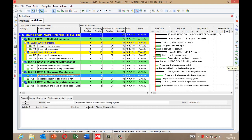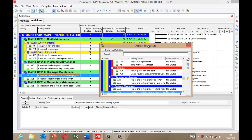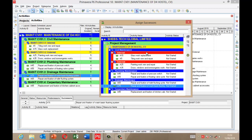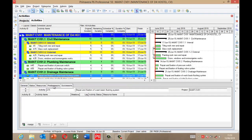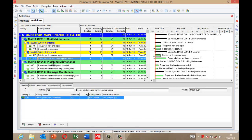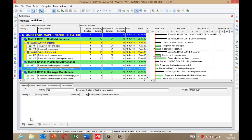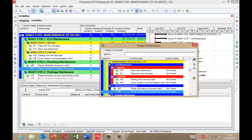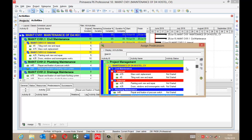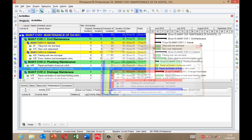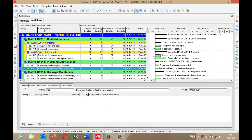To add the successor activity, you click this button and it will take you to your activity successors, where you choose your successor activity for the highlighted activity. The same way using the tab — if I'm adding a predecessor activity, I select the activity I want to have a predecessor, then click the predecessor tab, then click Assign, and expand to see a broader view to select the predecessor activity.